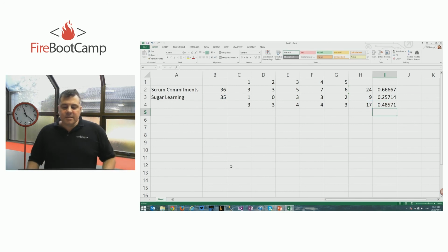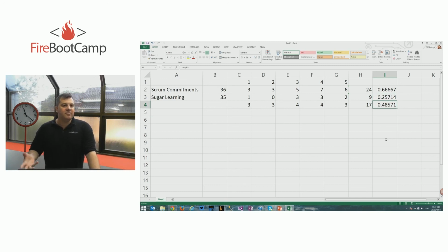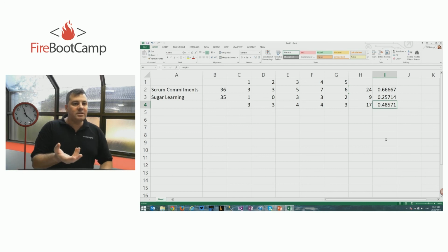You are saying at the end of week 5, we were supposed to be at roughly half, 50%, but we're at 25. So now you can go back and say, what did go wrong? Well, we're not as effective as we would like to be. This is why it's important to know what you committed to, because then you can compare.